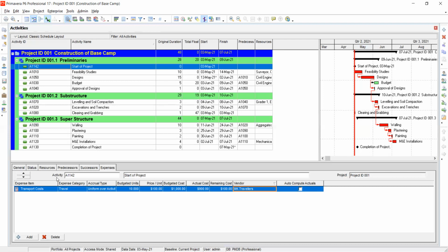So with expenses, let's say I want to construct a building, and I am clearing a site. I don't have any room, it is just a forest, and I want to make an emergency room. Does that fall under material or expenses? Those are expenses. They are overhead costs, like site offices. The project is to build maybe a storage building, but because that building is delayed, we have to put up some small buildings first for the staff, but later they will be removed. Yes, that is an expense. It is not part of the project, it is not a material, so it's an expense.